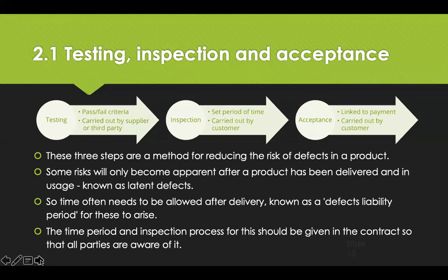And a defect is a failure to perform to an acceptable standard. A latent defect is one that is not discoverable through reasonable physical inspection or testing. So, for example, a piece of equipment may pass initial testing and so be contractually accepted, but then fails when put under full operational load because of a latent defect. So most contracts include a clause with a time limit within which claims for a latent defect have to be issued, and if not, the national law may have one.